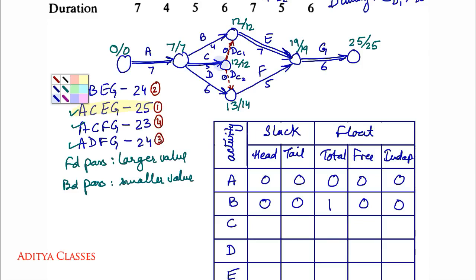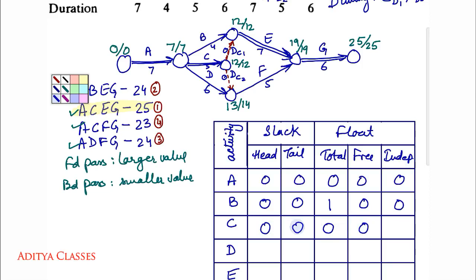For activity C: head slack is 12 minus 12 equals 0; tail slack is 7 minus 7 equals 0. Total float: 12 minus 7 minus 5 equals 0. Free float: 0 minus 0 equals 0. Independent float: 0 minus 0 equals 0.